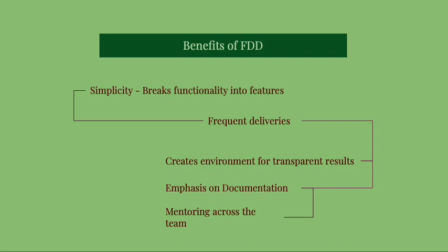Feature-driven development emphasizes documentation. This is done through status reports. The creators of feature-driven development advise on having visible weekly progress reports for everyone on the team. They also advise that in these reports, there's more of an emphasis on what was achieved rather than what was not achieved. Pretty similar to what we've learned in software engineering.